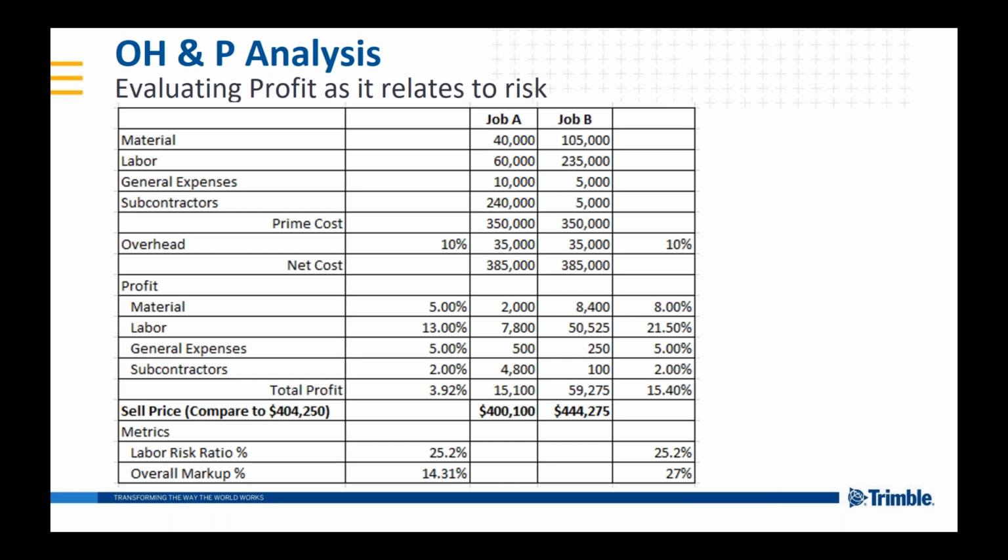So I would actually, in that case, instead of offloading everything that second, go grab the general contractor, whoever you're working for, and say, listen, this isn't where we were told we were going to be able to offload our stuff, and try to work it out that way. And notification goes to whoever your contract is with. So in that case, if it was a GC, that's who you need to notify. If it was with the owner, you need to take that up with the owner.